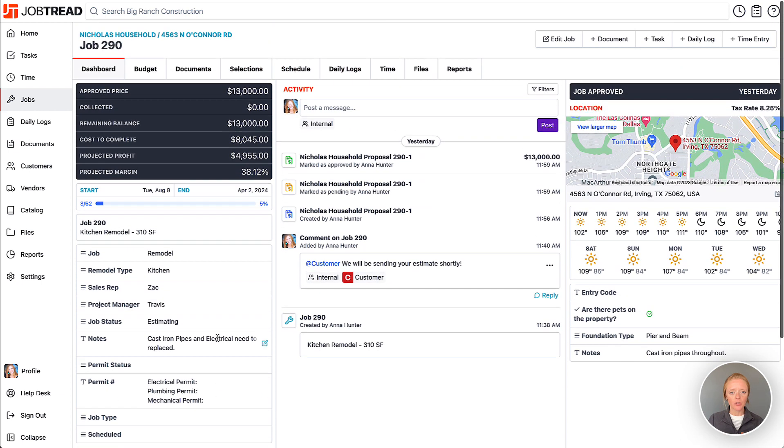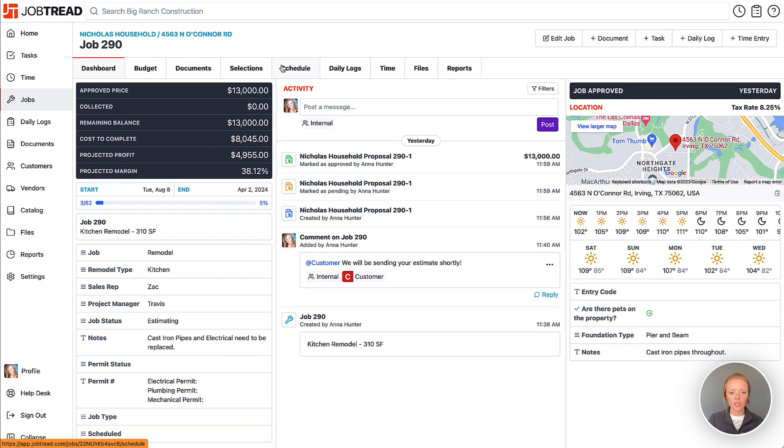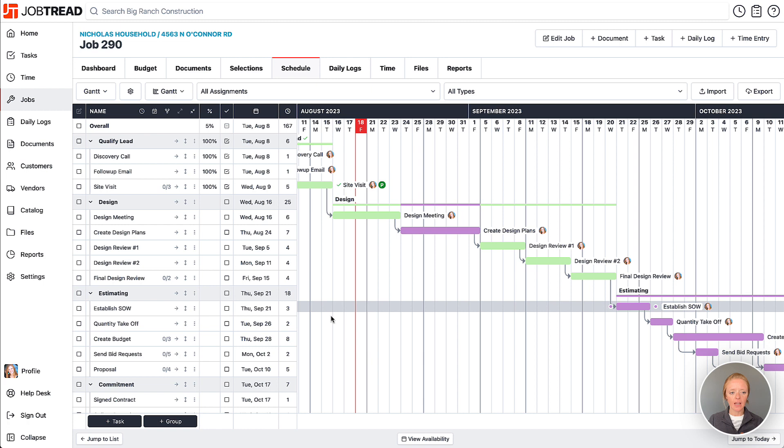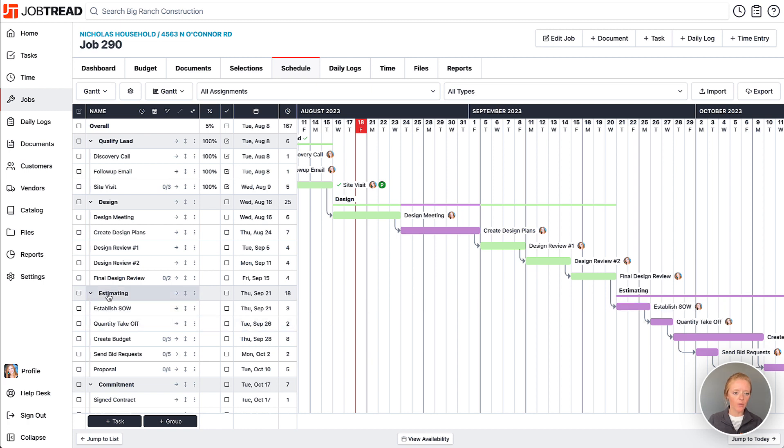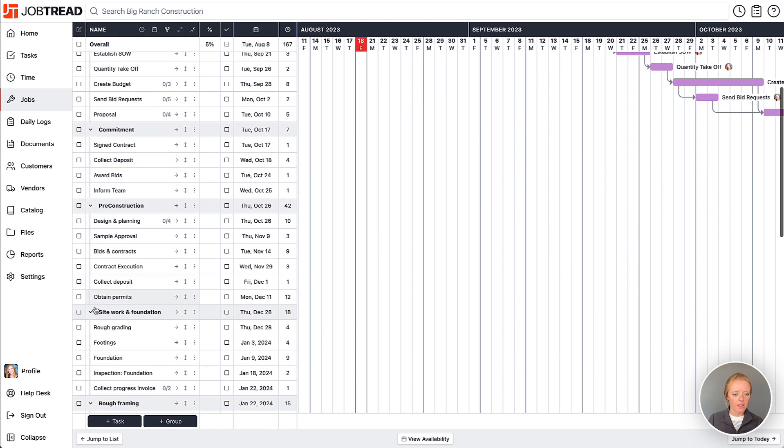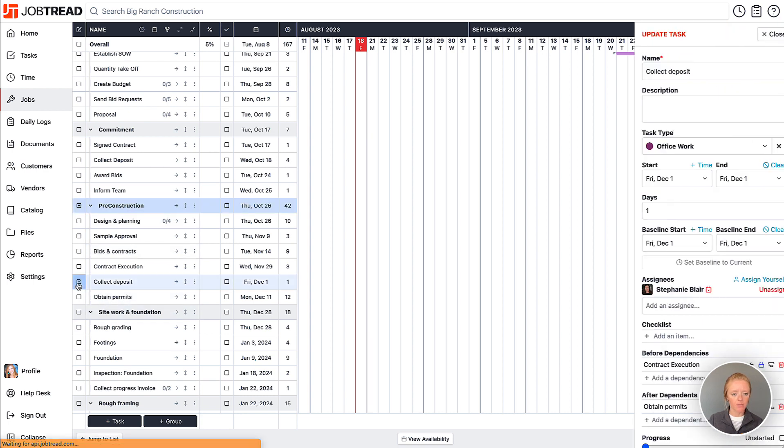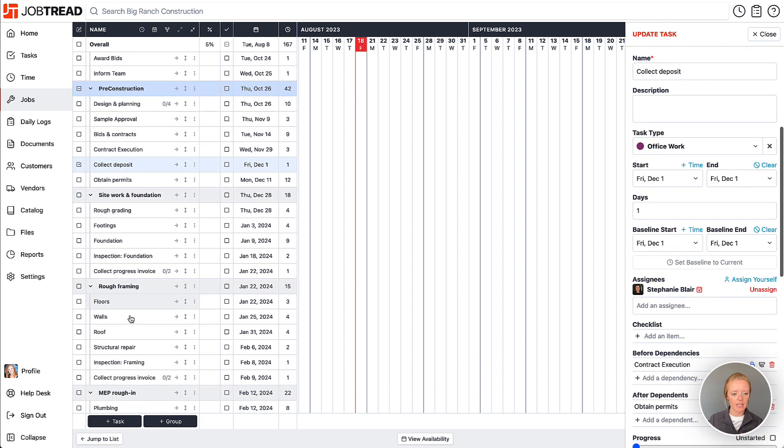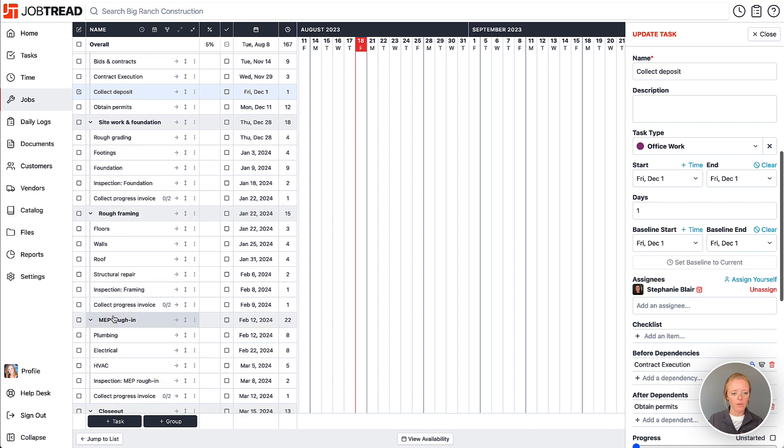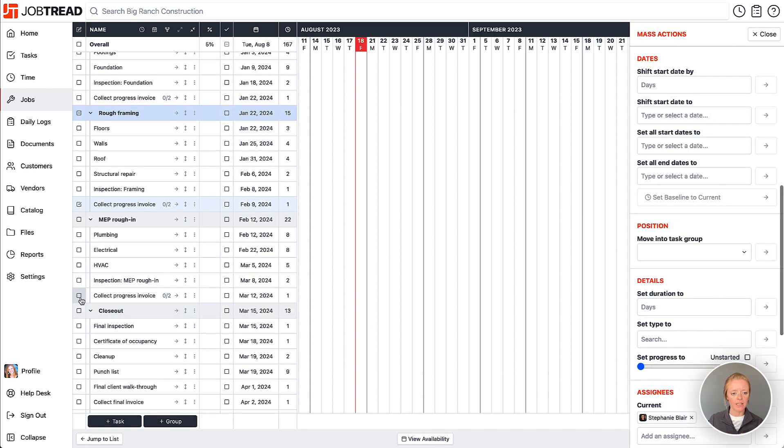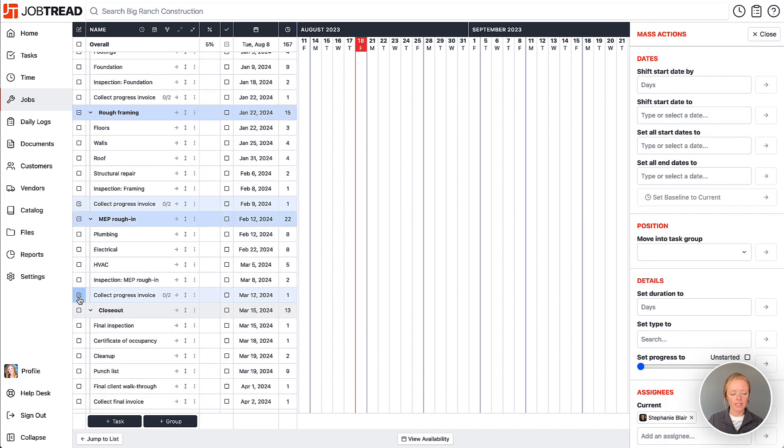So let's go into our schedule here and assign a couple of these tasks to our customers. So here we will have maybe in the pre-construction phase, collect the deposit we should be assigning to them, and then we also have some progress invoices that we'd like to assign to them.